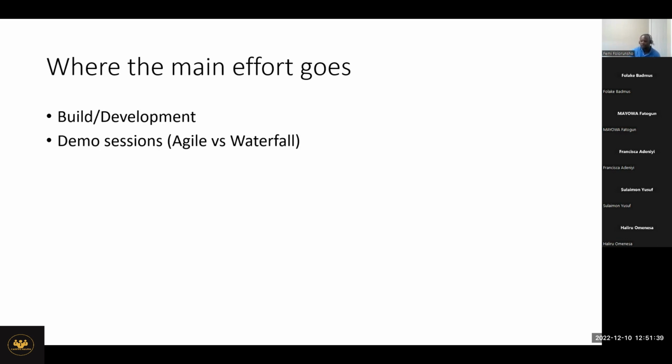So within the agile environment, what you do is that at every point of the build, so maybe we can call it a sprint if you're working in a Scrum environment, you have to do what we call a product demo. And the demo simply means, they validated the requirement that everything was okay. Now, when we start building, we want to be showing them. So maybe at the time that they did the validation, there were some things they didn't know, right? But now that you are bringing it to them that, okay, now the front page is working, employees can create a profile on the leave approval application, or we can import the list of workers directly from our database into the application. So we're showing the stakeholders how it's working, what it's doing.